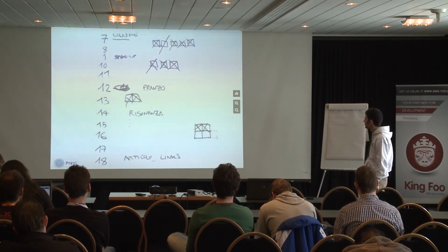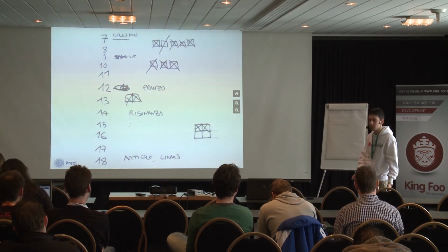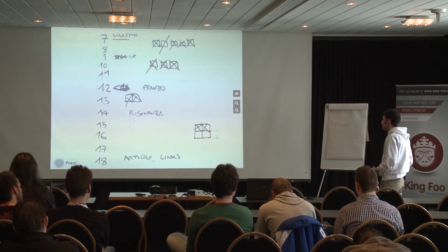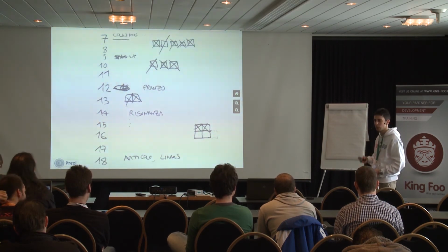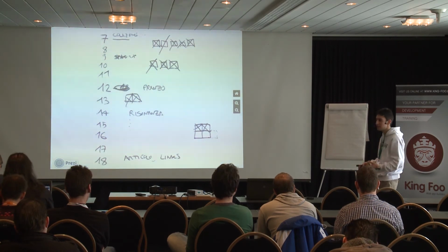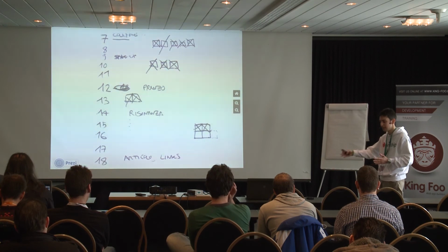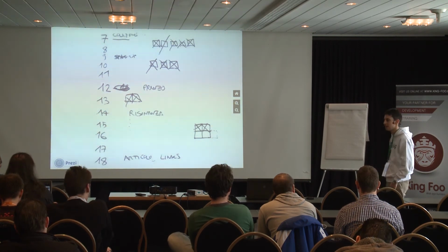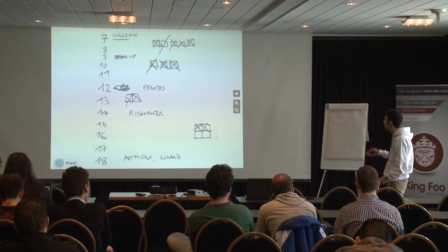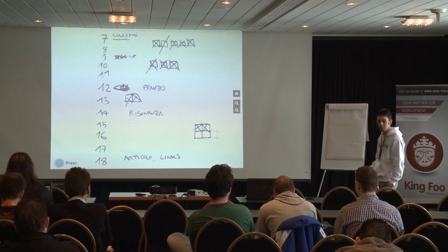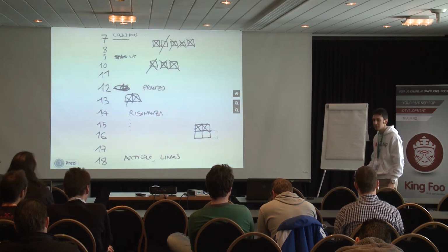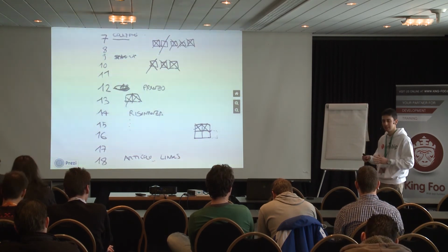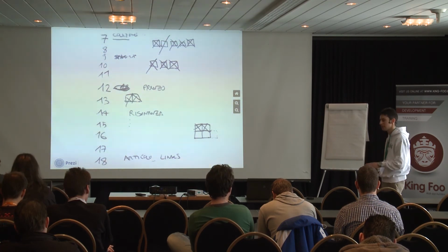And of course, you may get fewer Pomodoros done or more. It depends on how many interruptions, how many different things you have to do on the day. Usually we estimate an ideal day as 12 Pomodoros. So you will never be able to complete 16 Pomodoros, which is the 8-hour workday. It is normal. You have to communicate with other people. Breaks sometimes take longer. But a number of Pomodoros which approaches 12 is, I think, very good. Unless you're working as a freelancer. Then you can do even 20 Pomodoros in a day, because as a freelancer, no one is calling you. You're communicating with other people in very precise periods of time.